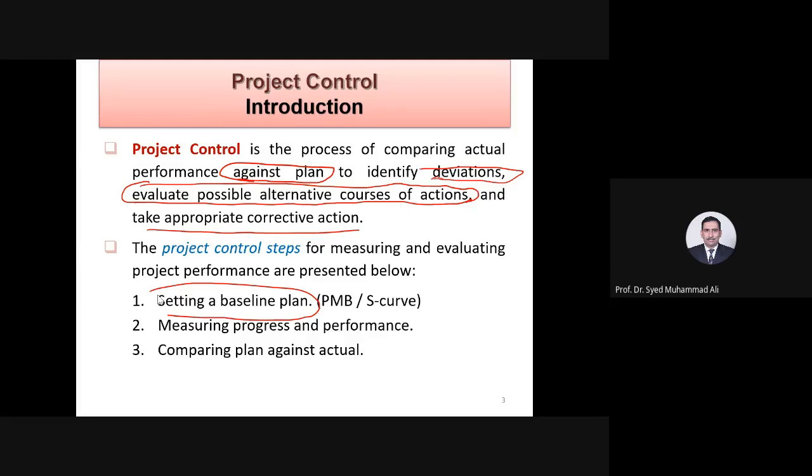So progress reports, either daily or weekly, fortnightly, monthly, will be required. Generally, I would say when it's field work, you must have a daily progress report. On each day, the site engineer or supervisor should be filling out a predefined pro forma and giving the daily progress. If you remember technical report writing, you must have studied that there are progress reports, daily progress report, weekly progress report, and so on.